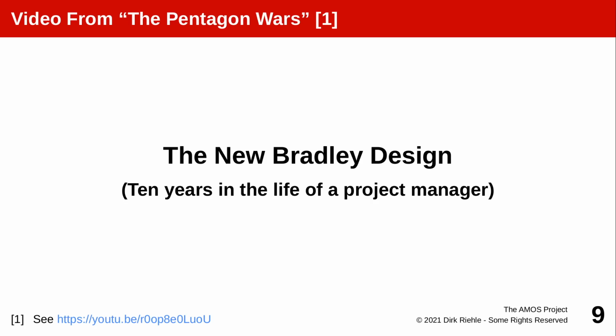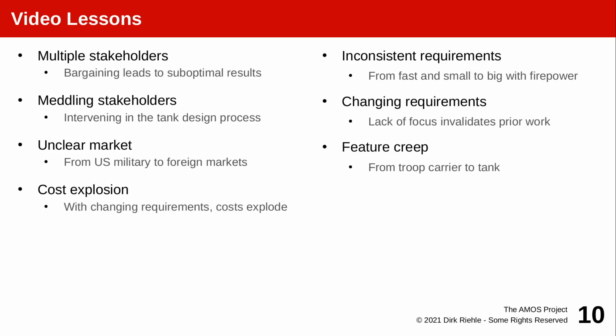So I trust that you pushed the stop button here, watched this video, and I usually discuss that in class. The key learning from this video is one of the biggest problems that you could have, both in a project, sometimes also in a product. It's called feature creep, meaning the requirements keep evolving, are never stable. Something gets added onto it. Sometimes things get changed because they were not cleanly specified in the beginning to start with, and so forth. And that has the worst possible consequences on hitting delivery targets, developing a product that actually makes sense, and so forth. So I hope you had some pity on that poor project manager and definitely do not want to end up in their position.